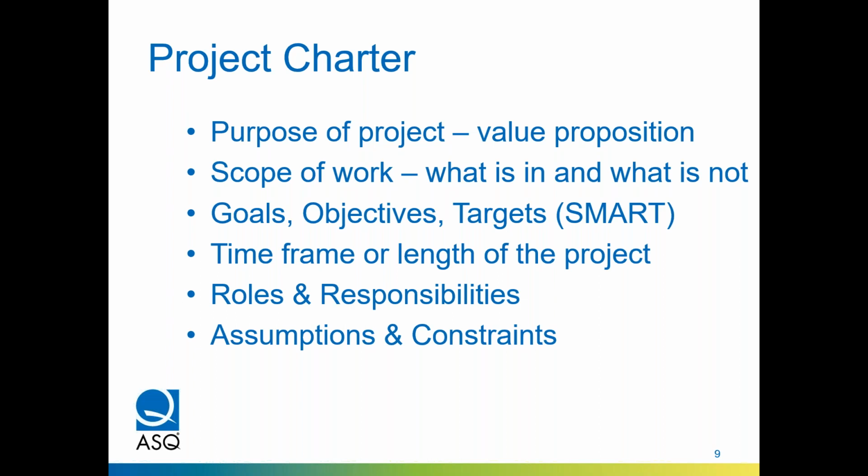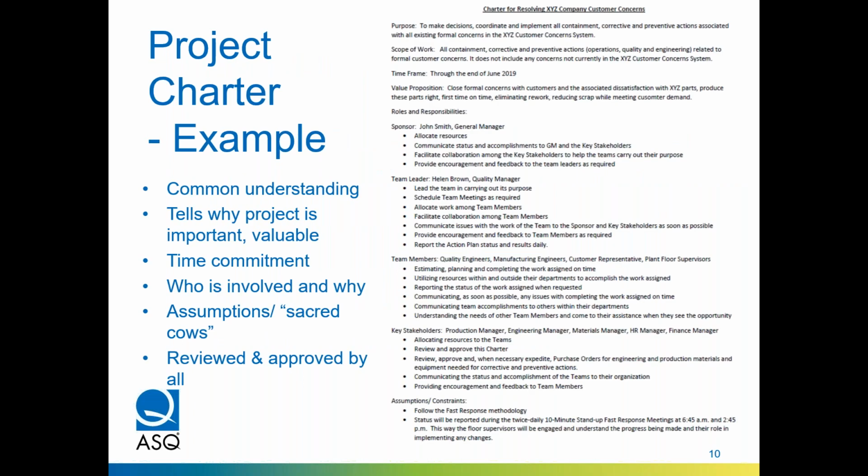One of the assumptions that I encourage is, particularly on part-time projects, and there are a lot of projects that are part-time, particularly continuous improvement projects, is just how many hours a week do we assume we're going to spend on this, each individual. That's going to be an important element of the planning game.